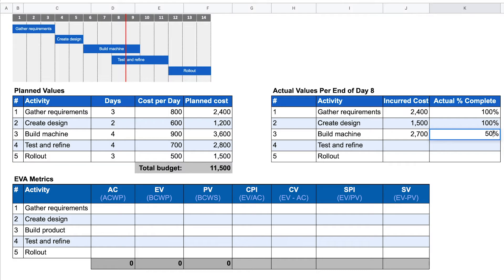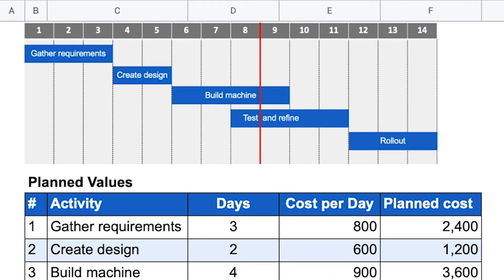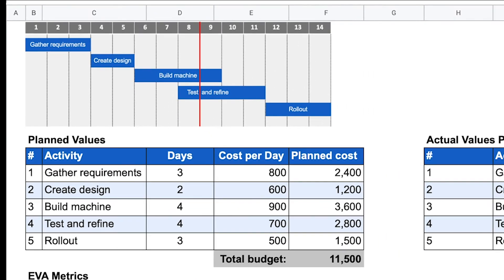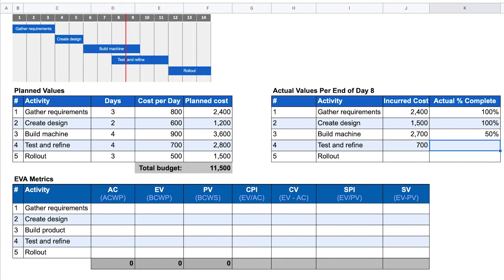We are 50% complete on activity three. As you can see, we should have already completed 75% of the build machine activity, but we have only completed 50% so far. For activity number four, test and refine, we have incurred a cost of $700 and it's 25% complete — we are actually within schedule there. For activity number five, rollout of the product, we haven't started yet, haven't incurred any cost, and it's 0% complete.